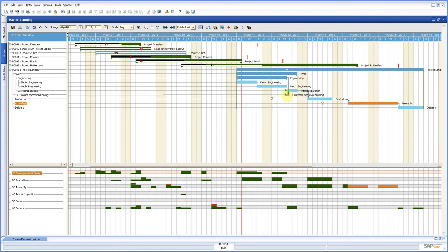And the last thing important for this planning project is this icon, the green and red symbol, which represents a milestone, and you can also see that milestone on the project bar above. Milestones are very important. They can mean very important steps in your project, and in this project bar you can have a couple of milestones. One of the things you can do is link invoices to this milestone. So if this milestone is finished, you can send your first invoice, for instance. That's a very powerful tool as well.